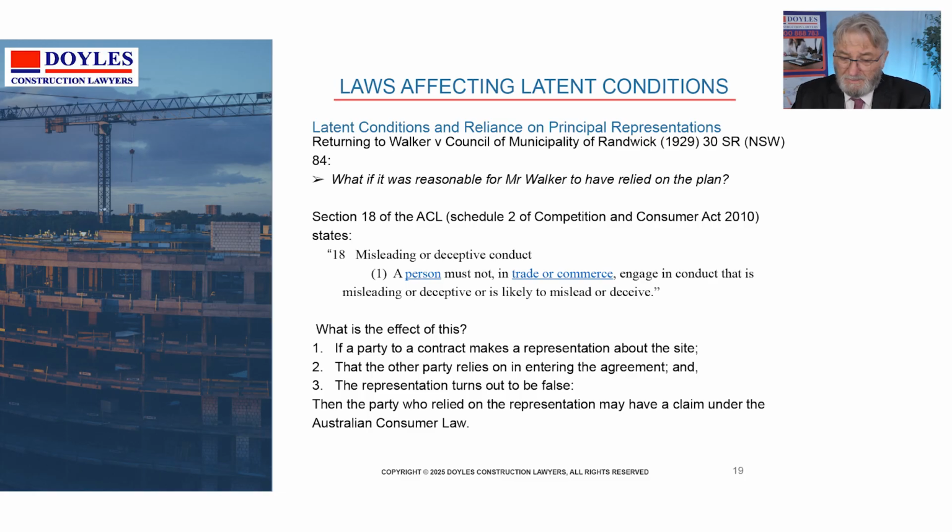And the situation is that if a party to a contract makes a representation about something which says, look, there's not much digging to do here, the rock's pretty soft and it'll come away in your machine easily, then that's an issue. If the other party relies on it, you must rely on it to be able to recover on it, and the representation turns out to be false, then the person who relied on the representation may have a claim under the Australian Consumer Law.